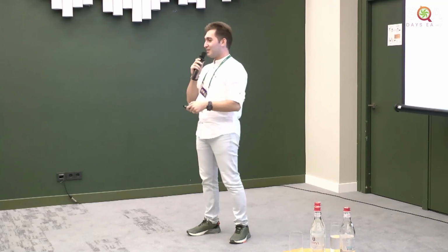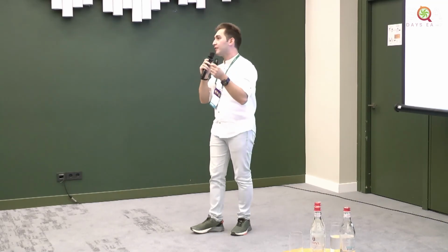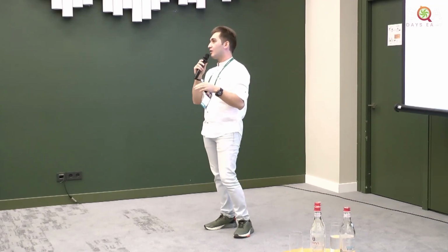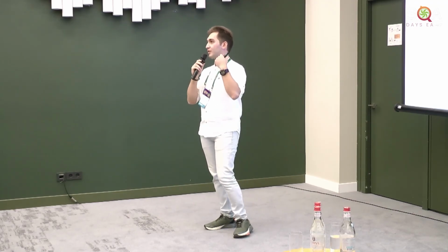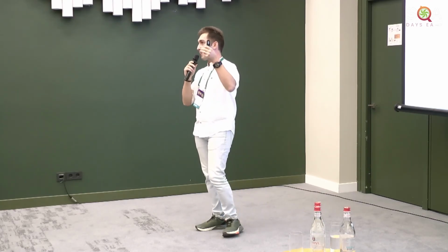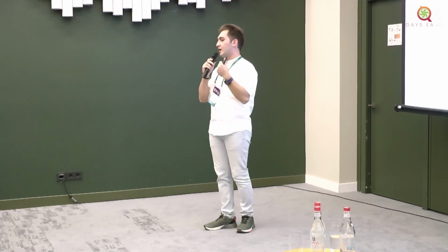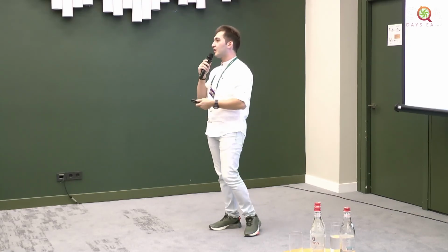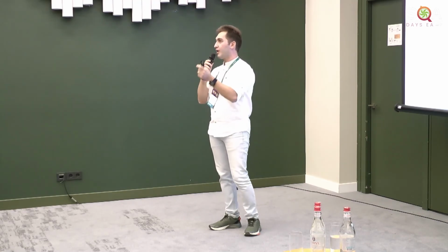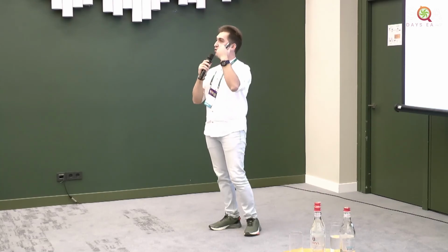Thank you very much, but I will answer in English. Currently we have another process for blocking teams, not only via the amount of bugs, but we are also reviewing the severity of the bugs. We are warning teams that they have critical or blocker issues on their team, and they need to reduce that number. And after a month, we are going to add a logic of severity into our components limitation.